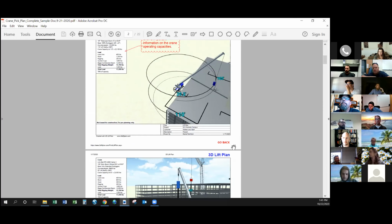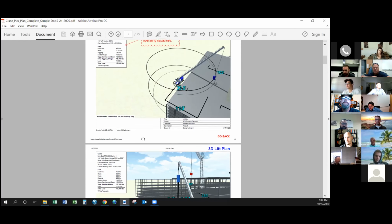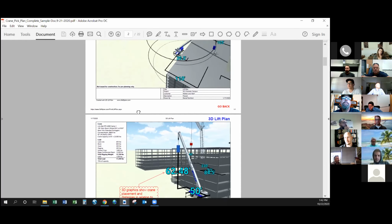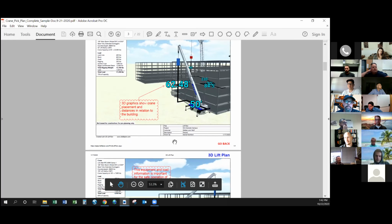I thought it got switched so that they were subcontracts because the operator is performing something on site, so it was a liability thing. Right, that's what I thought too. I think Joseph was working on, if he hasn't completed already, MSAs for the crane guys we use all the time. That is correct. Up until December or January, I think we were just operating with POs. I haven't ordered a crane all this year, but I know the idea is to switch them to a subcontract deal now, not just a PO. There's labor being performed on site, so it's got to be a subcontract.